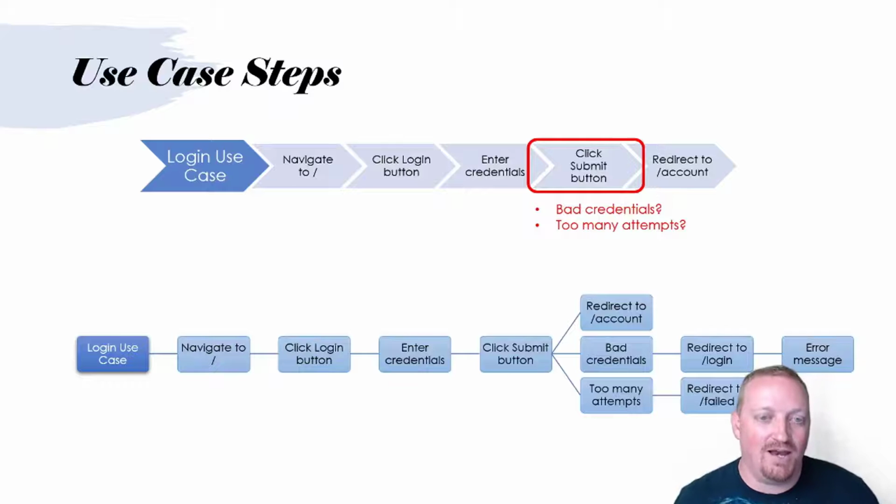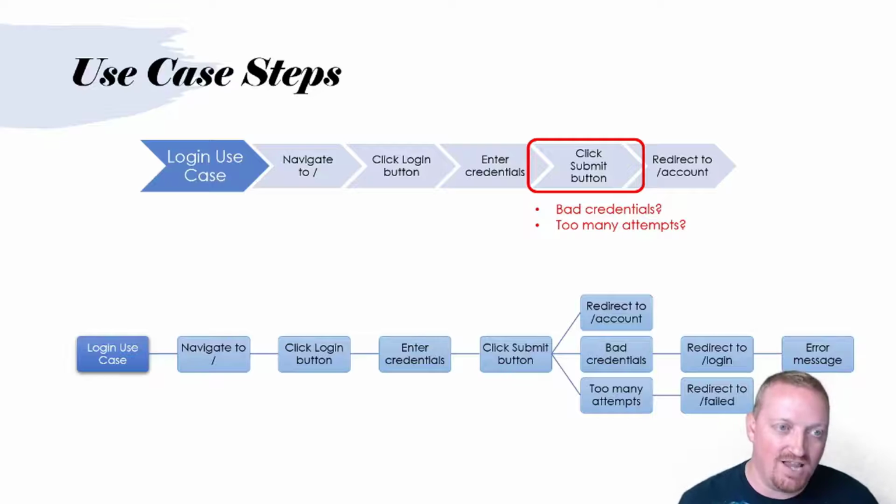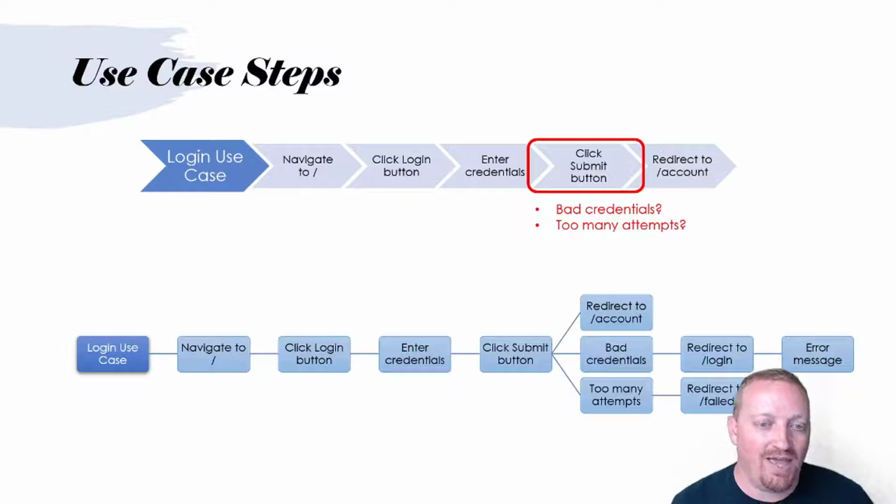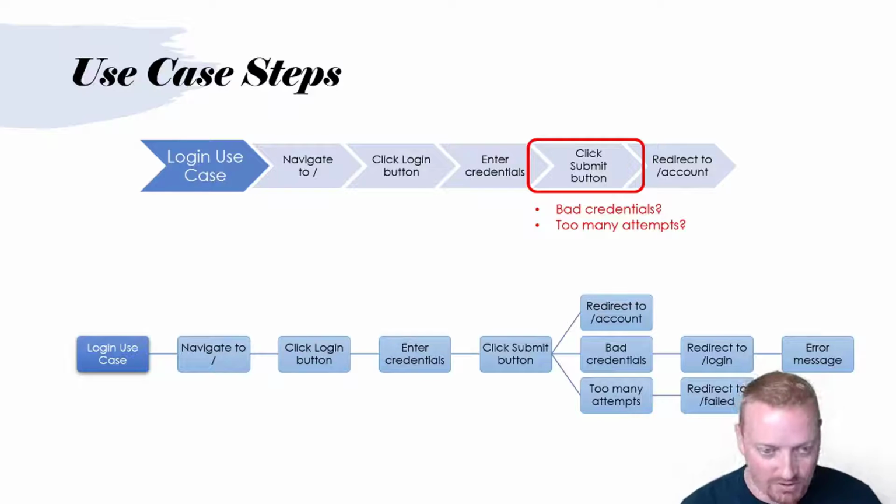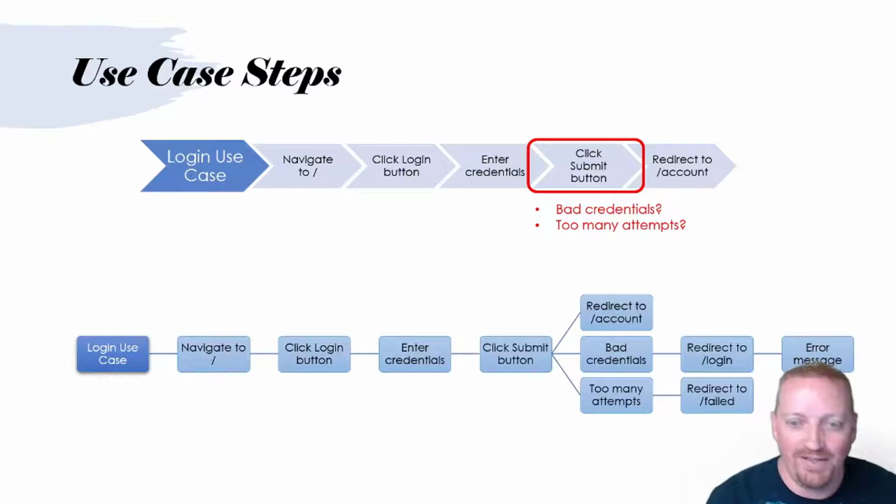Now, that doesn't mean that I think you need to have a one-for-one. It doesn't mean that every single step along a workflow requires its own story, but just know that if you are encountering a story that is too big, you should be looking at ways of breaking it apart by looking at the steps involved in order to accomplish it. And that's where you can find the seams within the story to write out some other stories. Okay, hopefully that is clear.